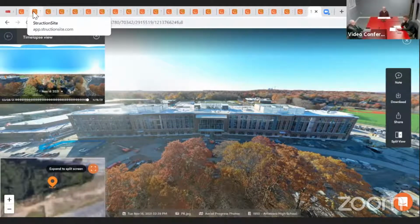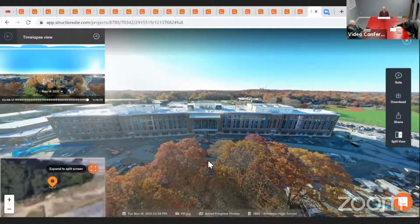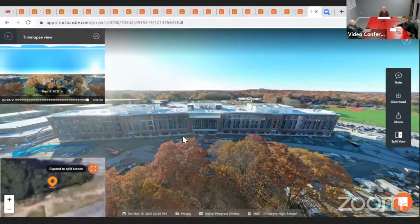Okay. And just a quick preview. One of the big things that will occur is that between June 16th and August 25th, we have to get out of the old building, get into the new building, have all the furniture delivered, get everything set up for the start of school. And so Anjanette and Marianne are going to be putting together a program for this meeting probably in January, maybe in February, but we're hoping in January, so that we can have a full vetting of our plan to occupy the building. That's correct.